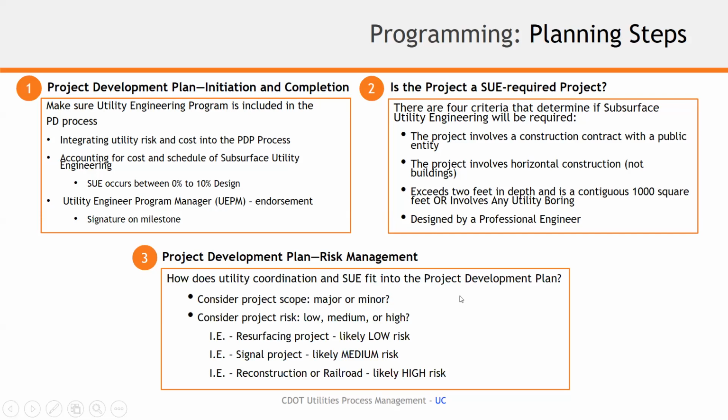And if you miss that step and try to pick it back up in the middle of your project at post FIR, you've really kind of set yourself back. And it can impact design, it can impact project budget, it can impact design schedule, it can impact phasing. So doing that assessment now is critical to the success of the project.